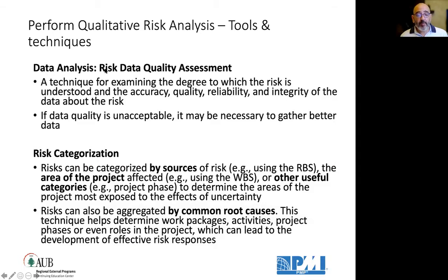Data analysis in the form of risk data quality assessment. This is a technique for examining the degree to which the risk is understood, and the accuracy, the quality, the reliability, etc. of data about this risk is reliable and accurate. Like I said, who is the best to give me the weather conditions in Kathmandu or at the summit? Okay, this is risk data quality assessment. If data quality is unacceptable, it may be necessary to gather better data.